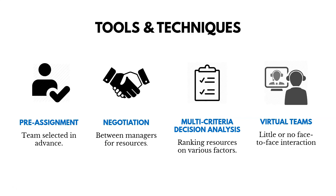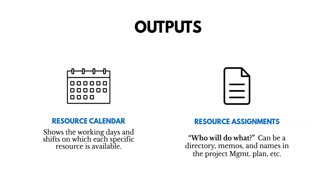Here are some key outputs of the acquire resources process. You're going to have a resource calendar, which shows working days and shifts when resources are available — important if you have resources in China who won't be working during Chinese New Year, for example. You'll also have resource assignments, which tell you who will do what, and can be a directory, memos, names, and so on in the project management plan.